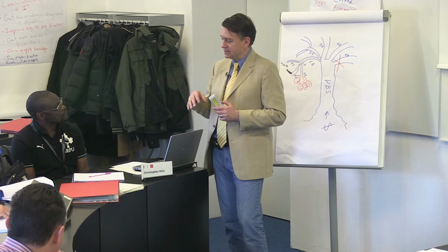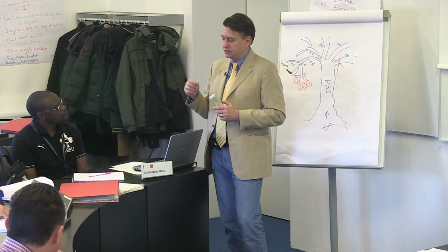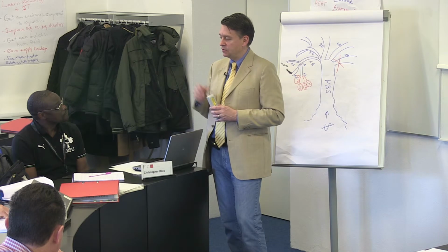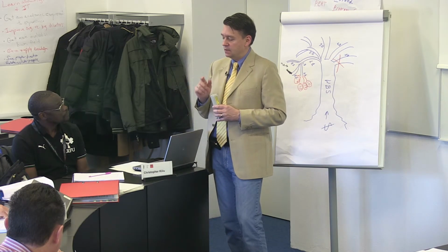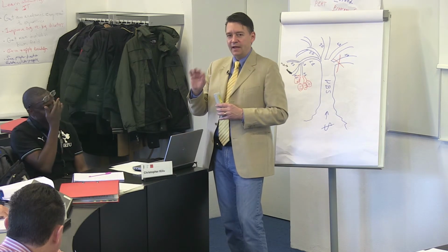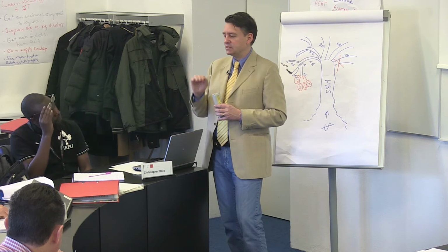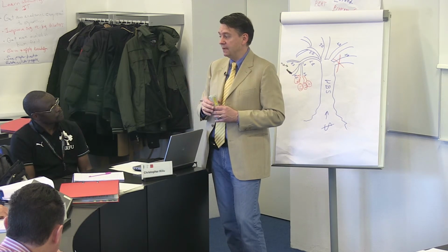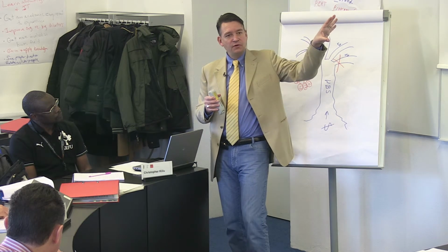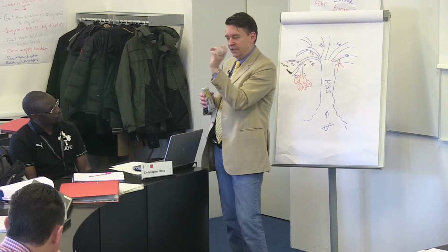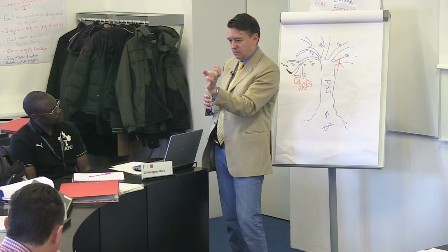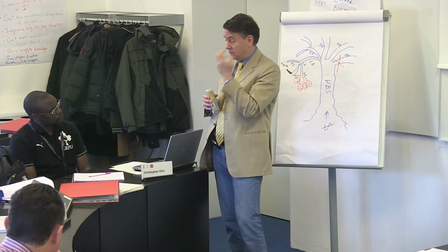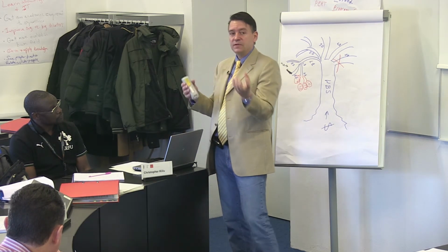So what I'm hoping out of this class is that if somebody says to you, I need you to execute your project 20% faster, you will not respond right away, yes or no, but you'll say, okay, I understand what you would like. Give me a day to figure out if we can do it and what the consequences would be. You go back, look at your critical path, look at each of the critical path tasks, and what compressing it by 20% would mean, right? And then you present options.